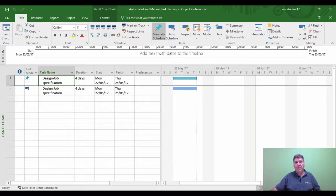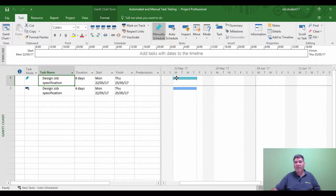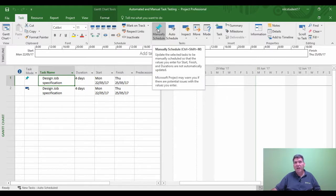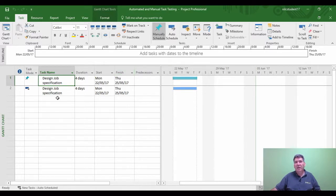If we look at task 1, I'm going to click on it — this task happens to be a manual schedule task. How can I tell? It's got a little pin next to it, a lighter blue bar, and it tells me on the task tab that it's manual schedule. The idea behind a manual schedule task is for the user to control the task the way they want to for their specific purposes.